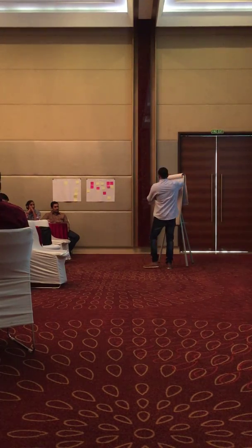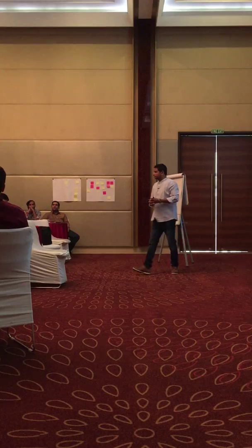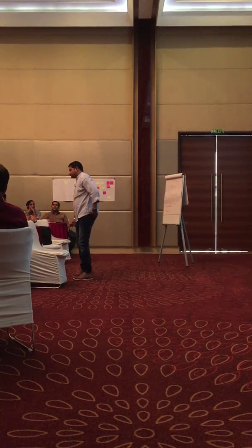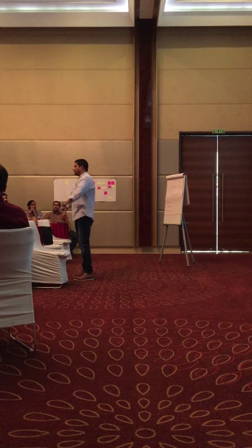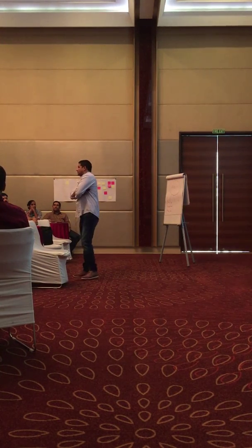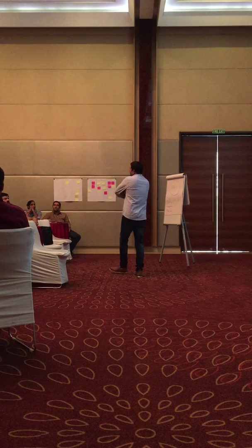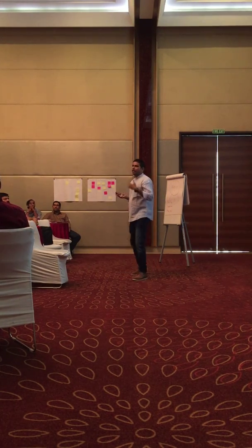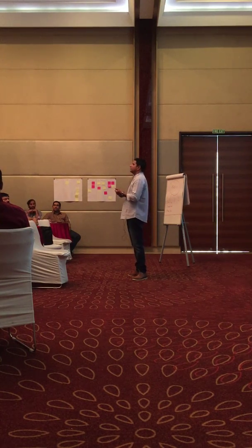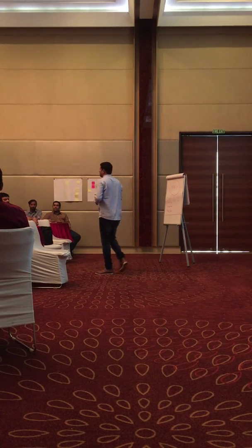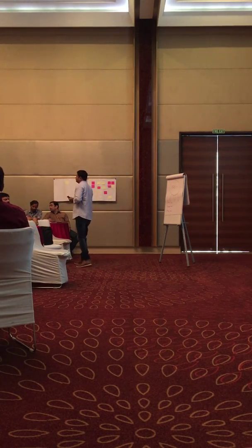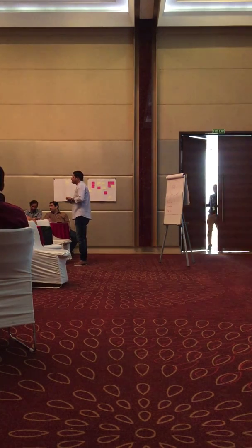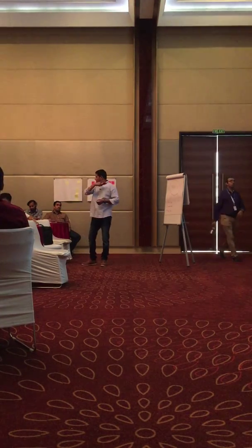I have a question. Please. Regarding the story point, the size of the story point, who is going to decide? Development team. The development team estimates with collaboration using the concept called planning poker. It is not the only estimation technique. You can use any other technique also, but story point is a widely used estimation technique. There is one question. In the product backlog, we'll be having the user story and then first we will cover user stories.